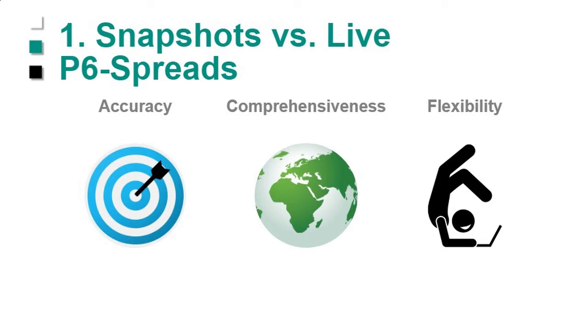First and foremost, it's built on top of our data warehouse, called EP Data Warehouse. It's a snapshot that we take of the data, and that can be done when people are ready. It can be manually invoked, or it can be automated. We have clients that take snapshots every single day, possibly after an integration has run, or they have it automated to run every day at midnight, so they've got the latest capture, or it could be weekly. It depends on your situation.